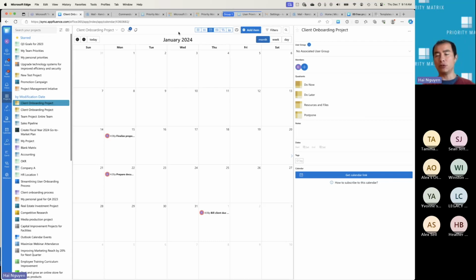So for example, let's just say if you're a finance department and on a monthly basis or on a quarterly basis, you have to close your books, right? So then you have a bunch of recurring tasks and you want to make sure that you get them done by a certain date, a certain timestamp. All you have to do is create one project that says book closing, and then from there, add all the appropriate tasks and then the due date for them, save it as a template. Every single quarter, you simply launch a project from that template. So you can sort of think about all the different use cases as long as you have recurring tasks, as long as you have like a starting date, etc.